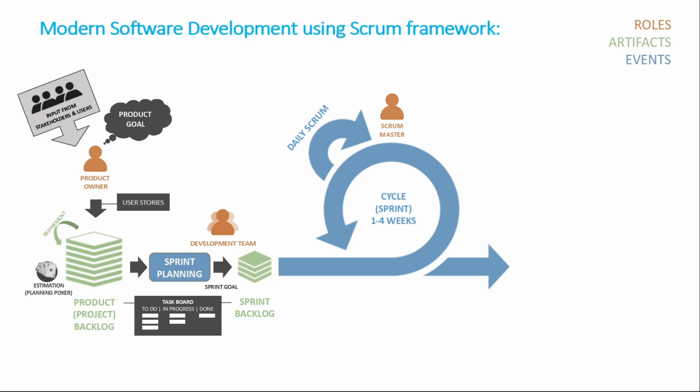During the work sprint, another event called the Daily Scrum is held each day. The purpose of the Daily Scrum is to inspect progress toward the sprint goal and adapt the sprint backlog as necessary, adjusting the upcoming planned work. The Daily Scrum is a 15-minute event for the developers of the Scrum team. To reduce complexity, it is usually held at the same time and place every working day of the sprint. If the product owner or Scrum Master are actively working on items in the sprint backlog, they also participate as developers.